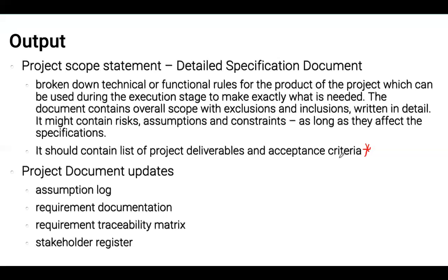That's also going to have to go into the traceability matrix, and then stakeholder register, so that we can track which requirement from which stakeholder is going to be satisfied by which technical specification, which is nice to do.